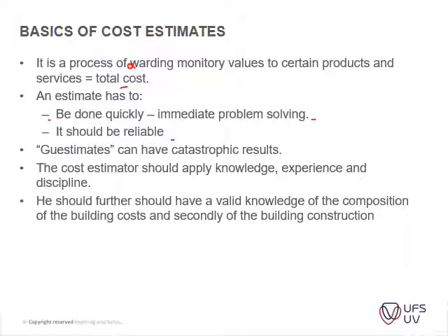Basically, he just needs to understand that if you take out this wall, it might not necessarily save money, because now you suddenly have to put in structural reinforcing in the ceiling to open up this space. So that's the basics that the cost estimator has to look at. He has to know what the influence of one professional is on the other. So for instance, if the structural engineer changes something on this side, it may influence the look and feel of the architectural side as well.